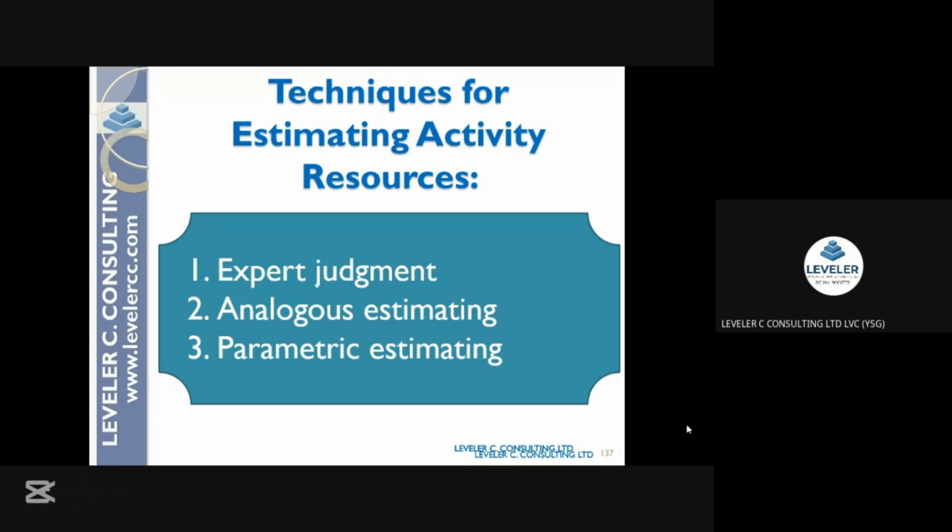For example, if you are making an estimate today for a client and you have checked the market, this is today's rate in the market, you will base your estimate on that day's market, because the following day, there is a possibility that the price of material will jump. So whenever you are estimating, always estimate based on the current trend. We call it the basis of estimates.